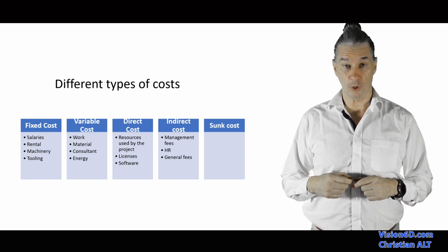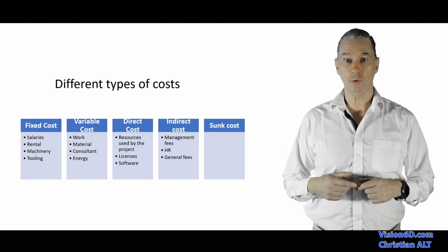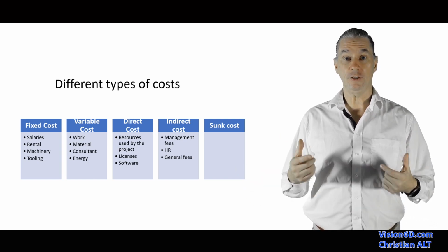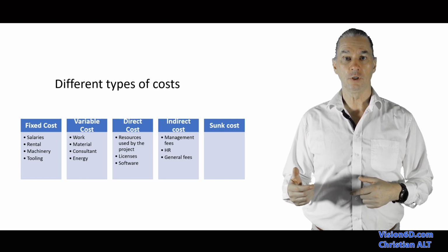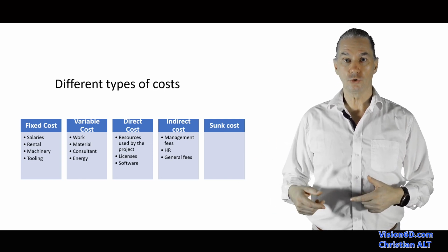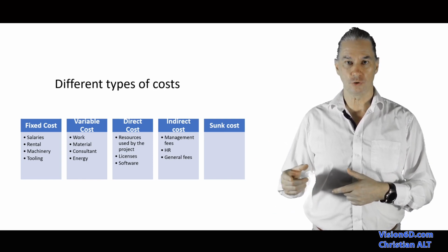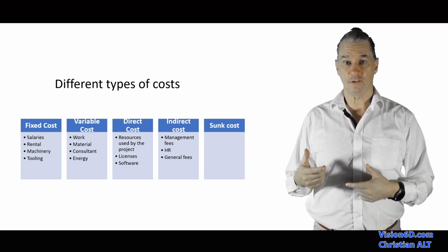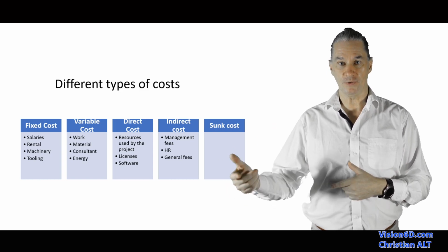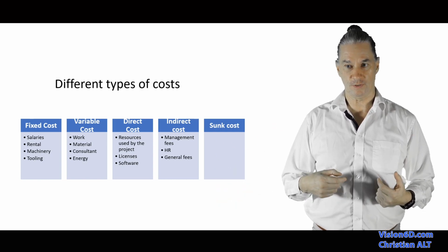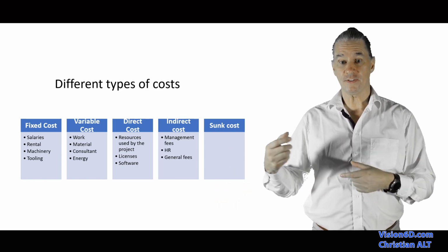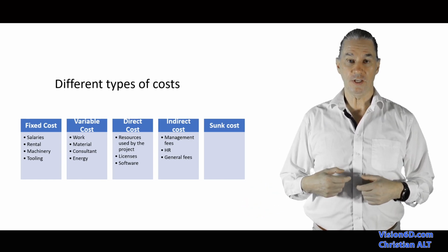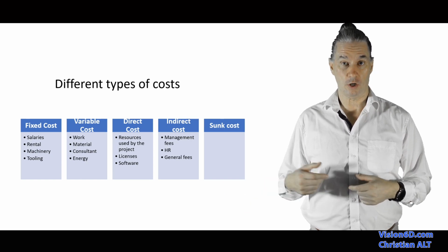Indirect costs to a project could be, for example, when I hire some people to work in my project, I use the HR department to search for those people and to go through all the selection process. So the cost of that HR department, because they did something for my project. How is that cost due to the project? This is what we call indirect costs.